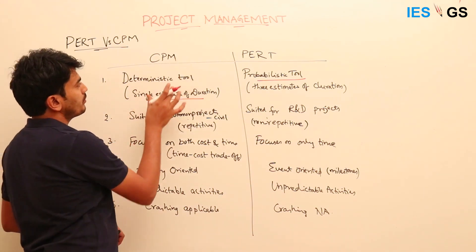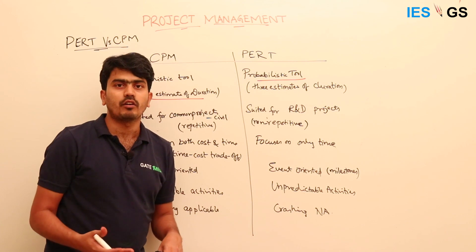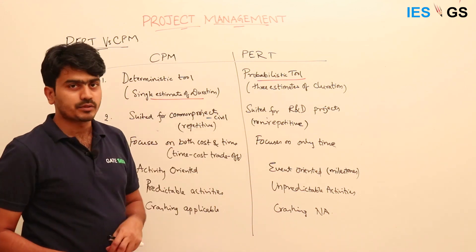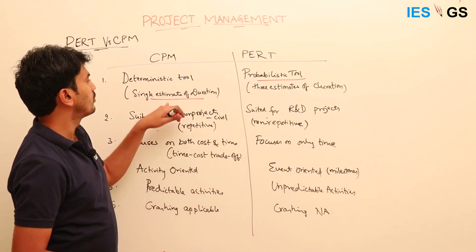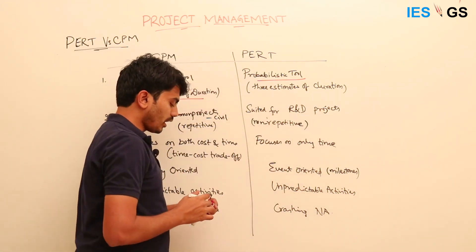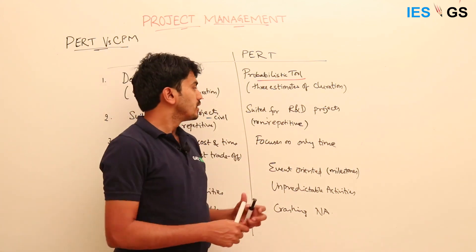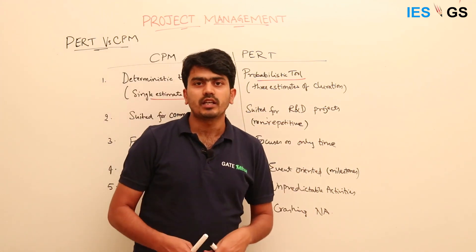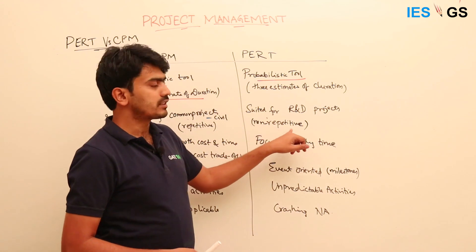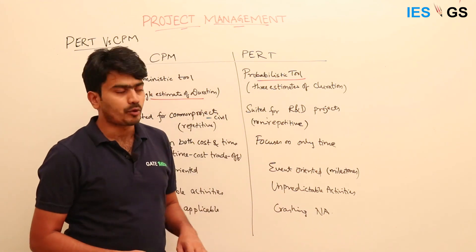CPM is suitable for common projects like civil projects, which are repetitive in nature — the same activities are done across various projects and their timings are known, consistent with its deterministic nature. PERT is used mainly for R&D projects; it was invented as part of R&D requirements. R&D projects are non-repetitive — every R&D project is different — so we don't know how much time a specific activity will take.